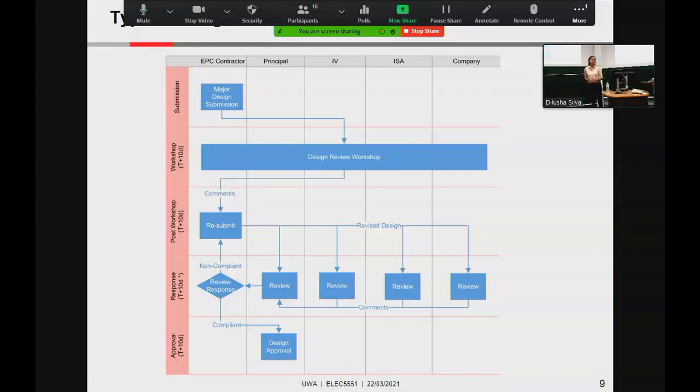The customer is paying. If they want you to change things, you can change, but you have to also do your own analysis: is it going to cost you? You cannot just promise, yes, we'll do that, and then you have to buy more materials. Or it's going to actually increase construction effort. For example, for this fiber project, the customer asked me, can you use rodent protected cable? I said, okay, I have to look at that. It's not a requirement. Checked that price is almost double. So I couldn't just say, yeah, we could do that, because that doubles our material cost.